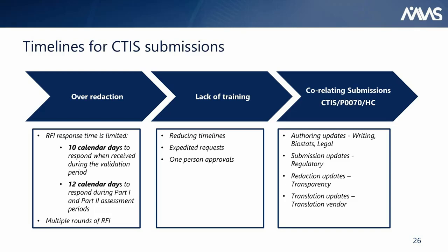Along with the CCI handling, process efficiency, and shrinking timelines, another struggle in front of sponsors is managing the translation of documents into the local language and redacting such versions. With the translation need, the sponsor needs to understand three main things. First, shortlist the documents to be translated. Second, hire a reliable translation partner. And third, watch the timelines closely.